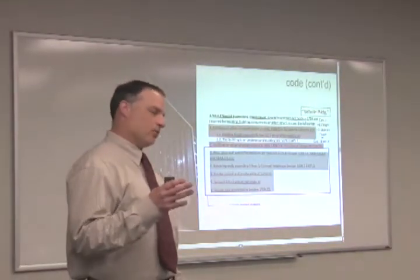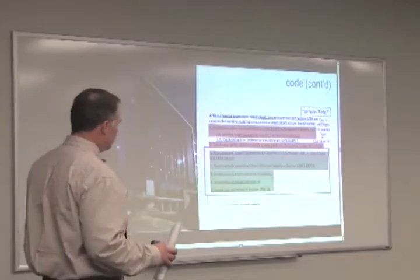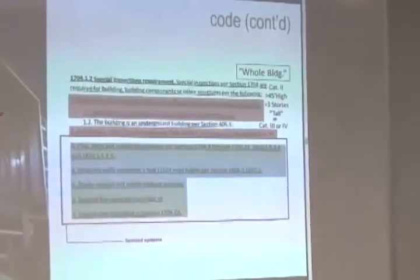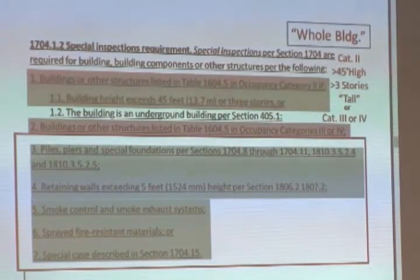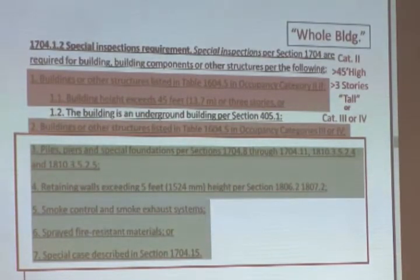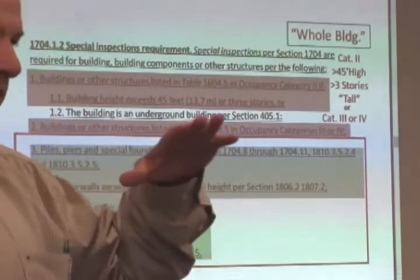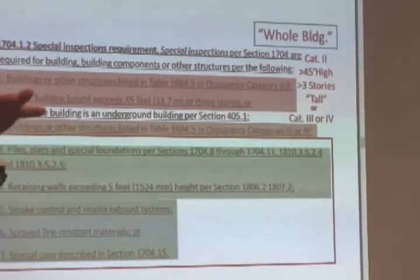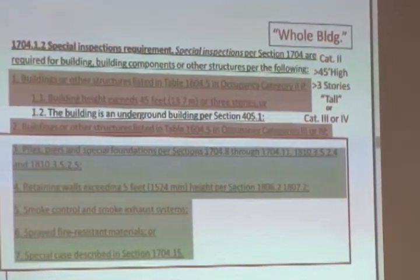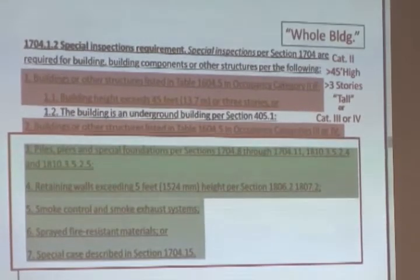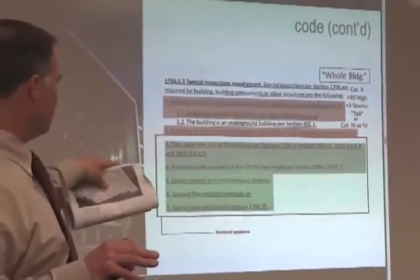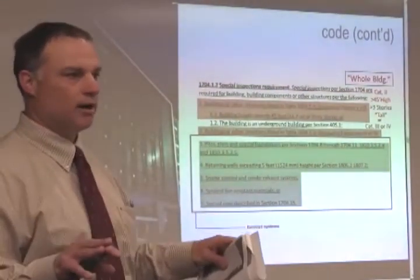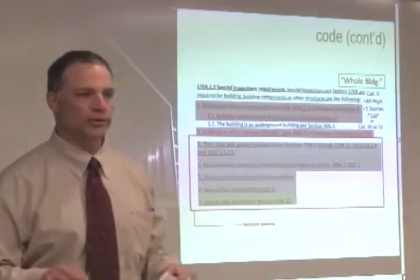Now, the code — and this is where it gets sort of complicated. When we go into the code, section 1704.1.2 is the root of where the code says you shall provide special inspections. From that point, there are two divisions of special inspections. There's the whole building type, which is basically the structural systems inside a building. Then there's a second type — let's call them itemized systems — which are systems that, in any building, if you have them, require special inspections, even in the lowest-level buildings. Itemized systems include things like deep foundations, retaining walls, smoke systems, spray fire protection, and other special engineering systems.